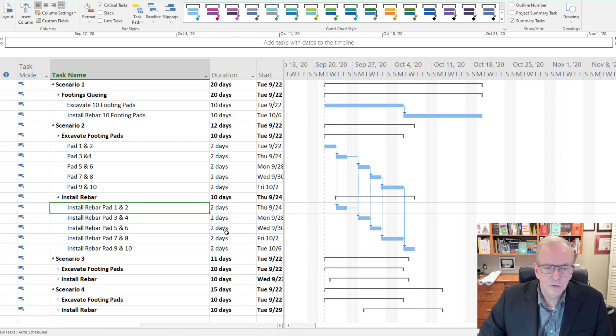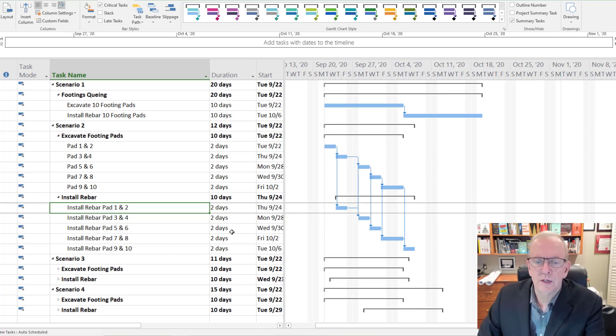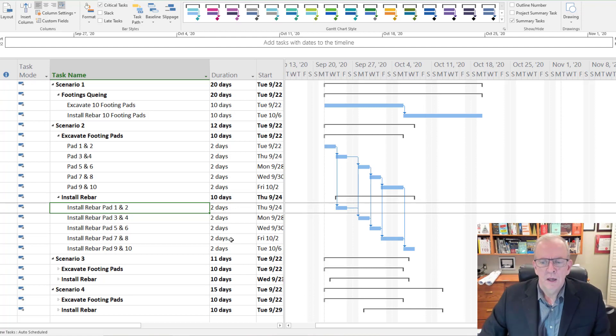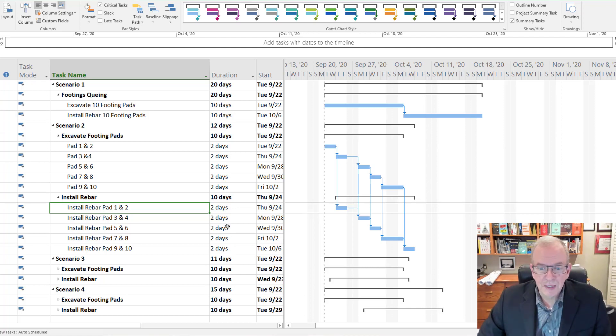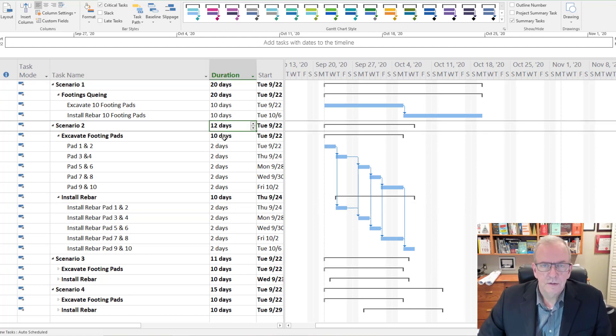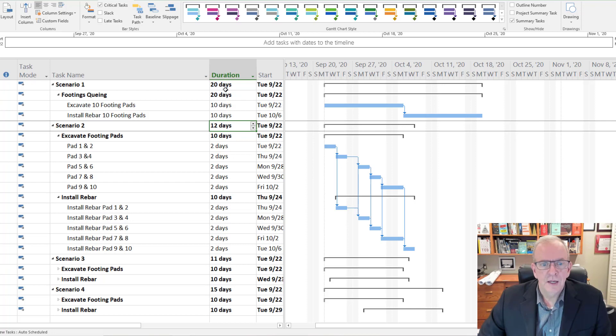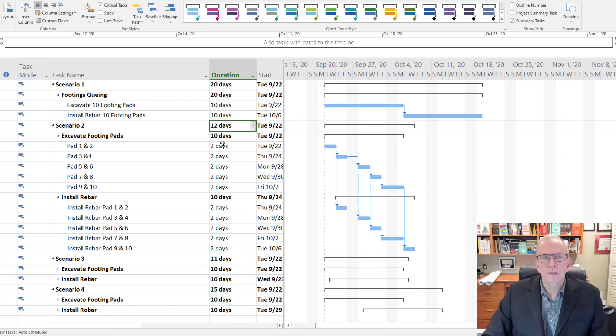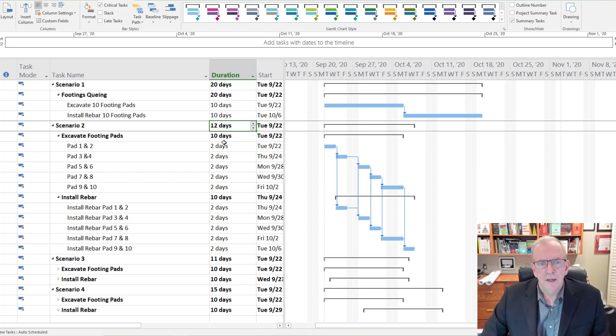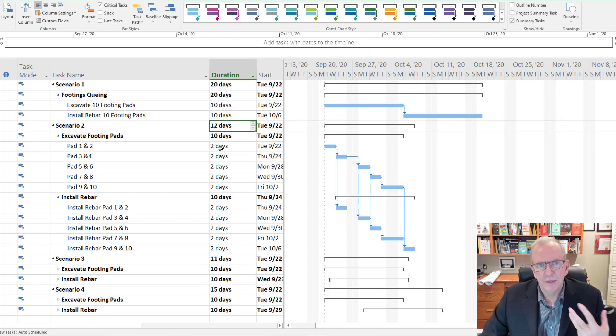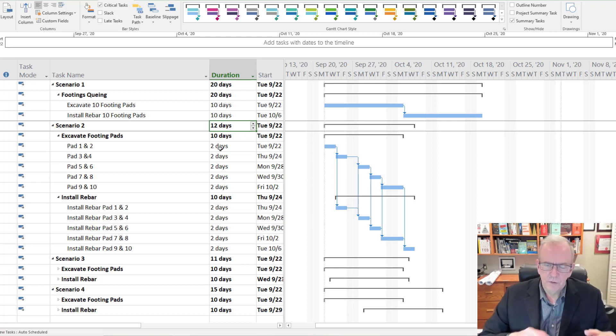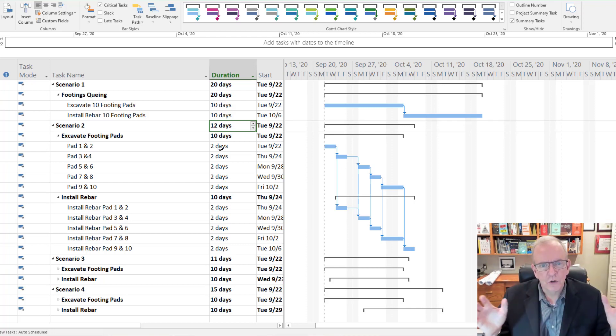Everything is at two days. There's flow to the work. Now the big thing is 12 days, right? 12 days instead of 20 days.